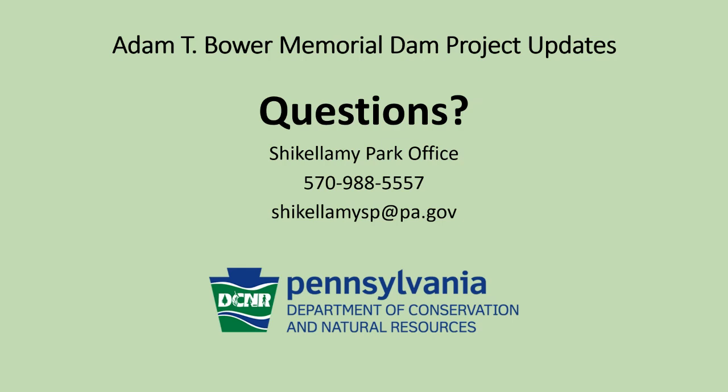So here's a question about contractors for this project. We do have our own in-house maintenance crew, with additional members from the regional swing maintenance crew as well. So we do have DCNR maintenance, people that are very experienced and are very familiar with the dam due to operating it for many, many years. So DCNR, we're the ones that actually do the bag removals and installs ourselves. However, other project components, such as the gravel causeway road, are contracted out. And sometimes other components may be contracted out, but for the most part, we really try to remain doing it in-house.